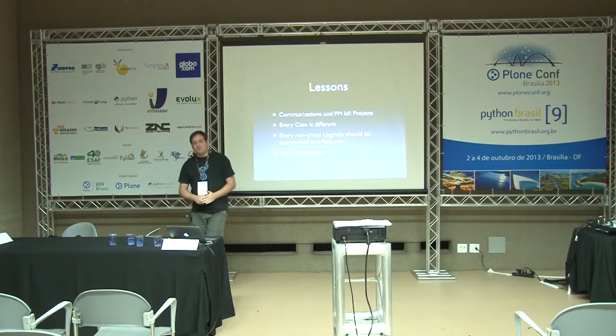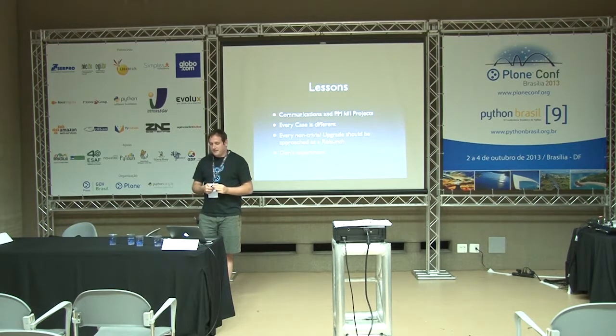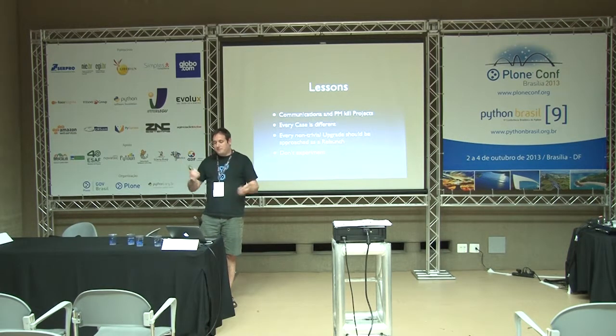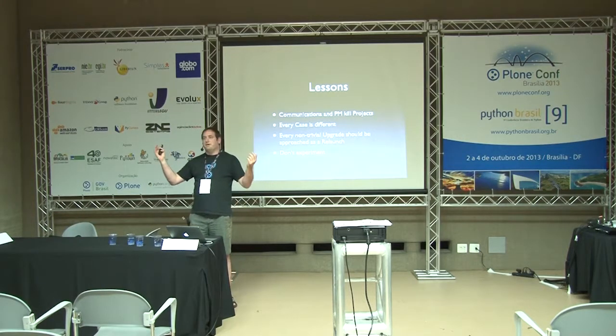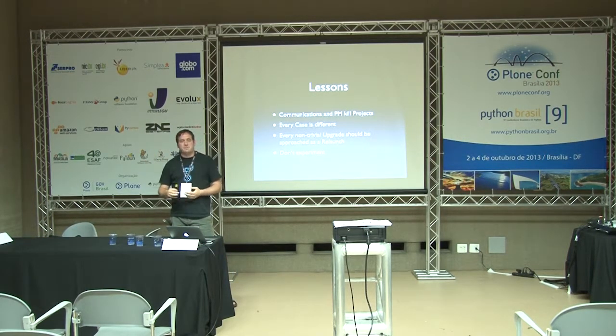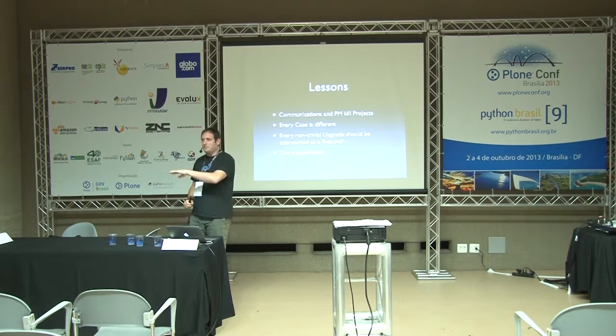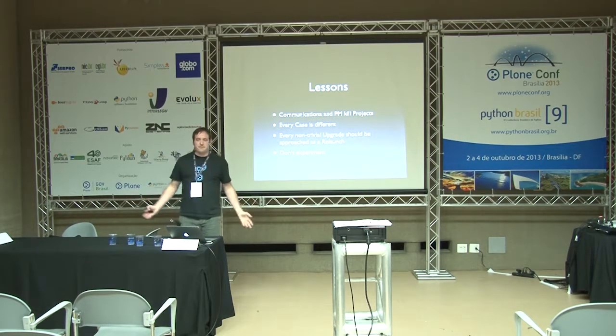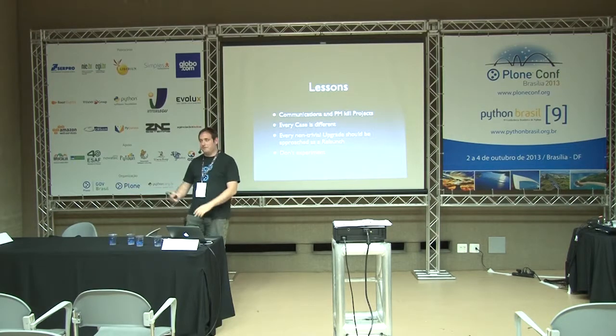So don't try more than two new technologies at once, and don't experiment too much because some things might go wrong, and keep a backup plan. With the toolbar, that's kind of easy. You have Diazo. The customer was too cheap to pay us for theming the backend, so we got another domain like edit.blahblah, and that was only approachable through virtual private network, and it was unthemed, and the customer is absolutely happy, and we don't have to use the toolbar that is not yet 100% production ready.